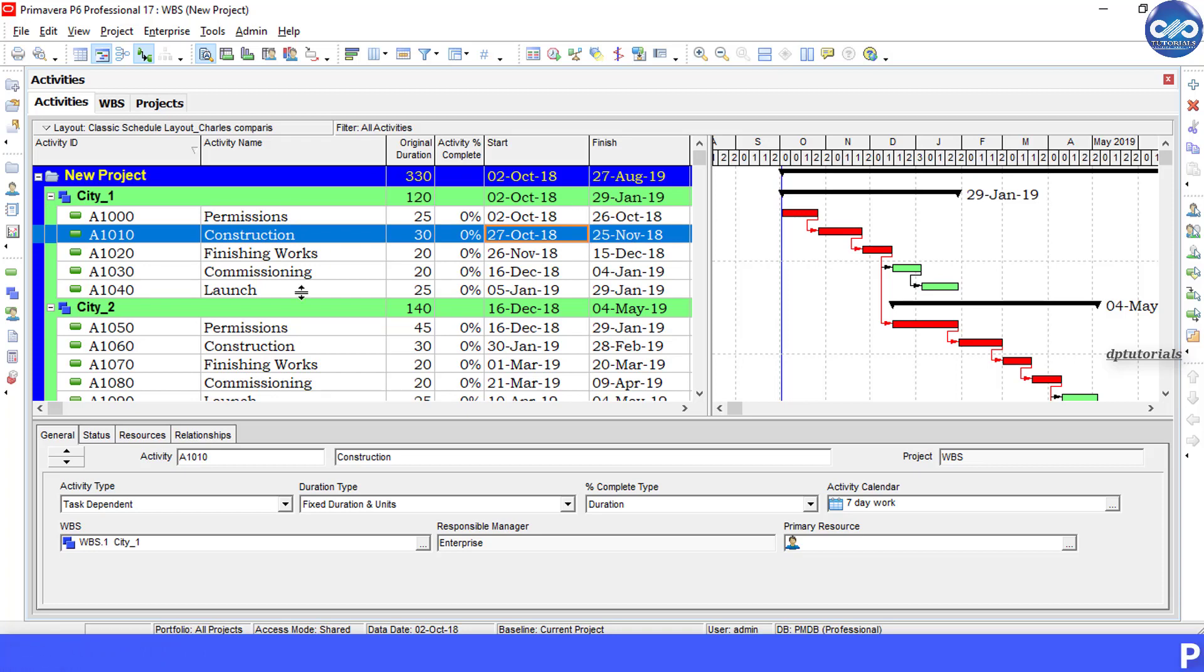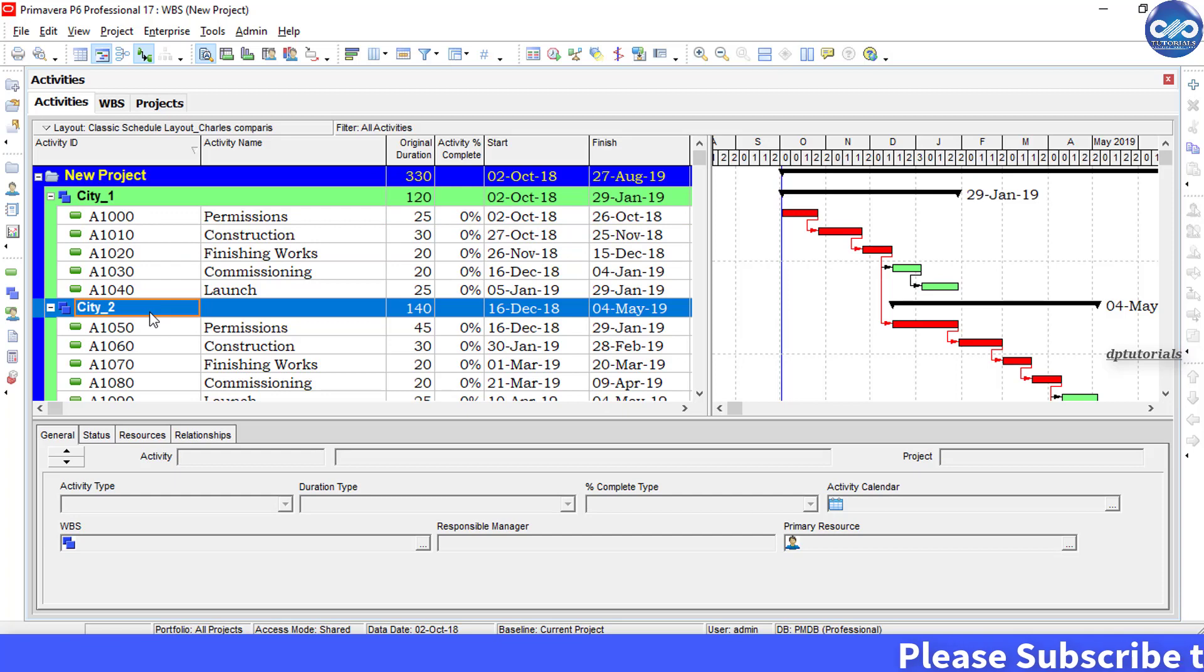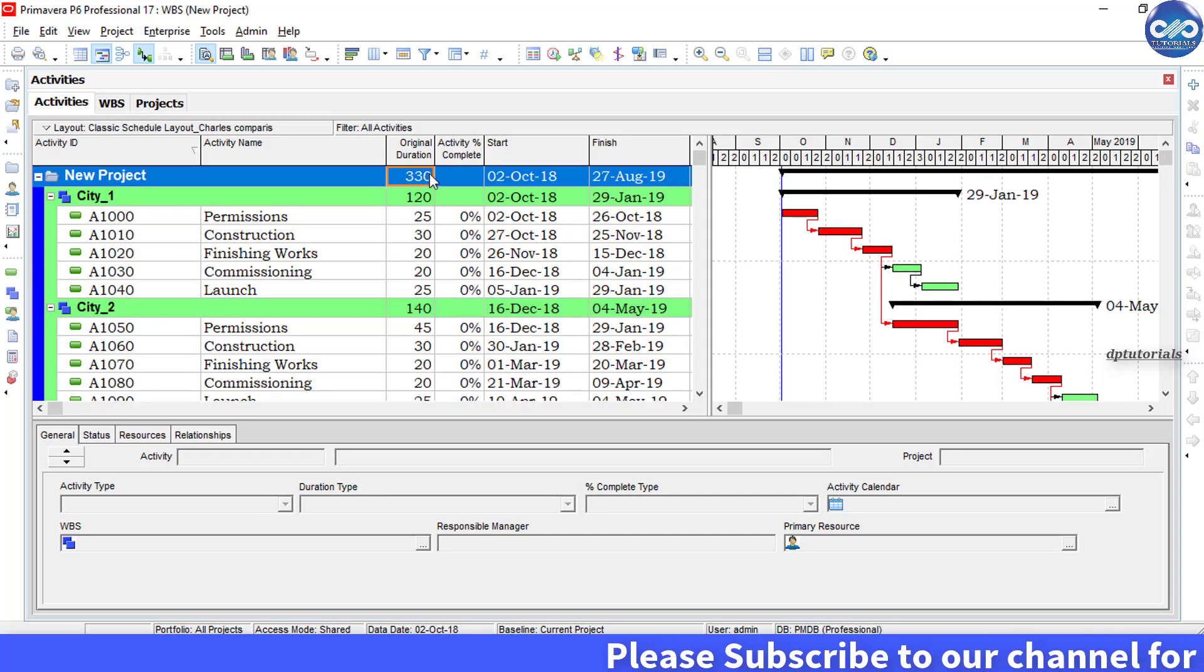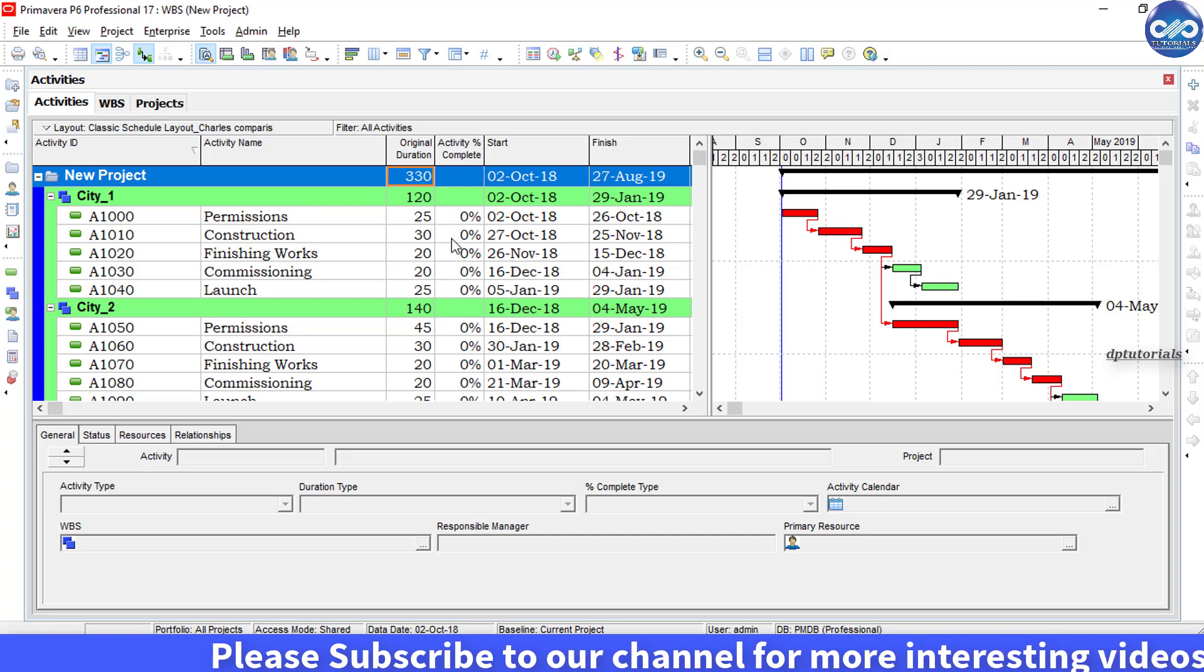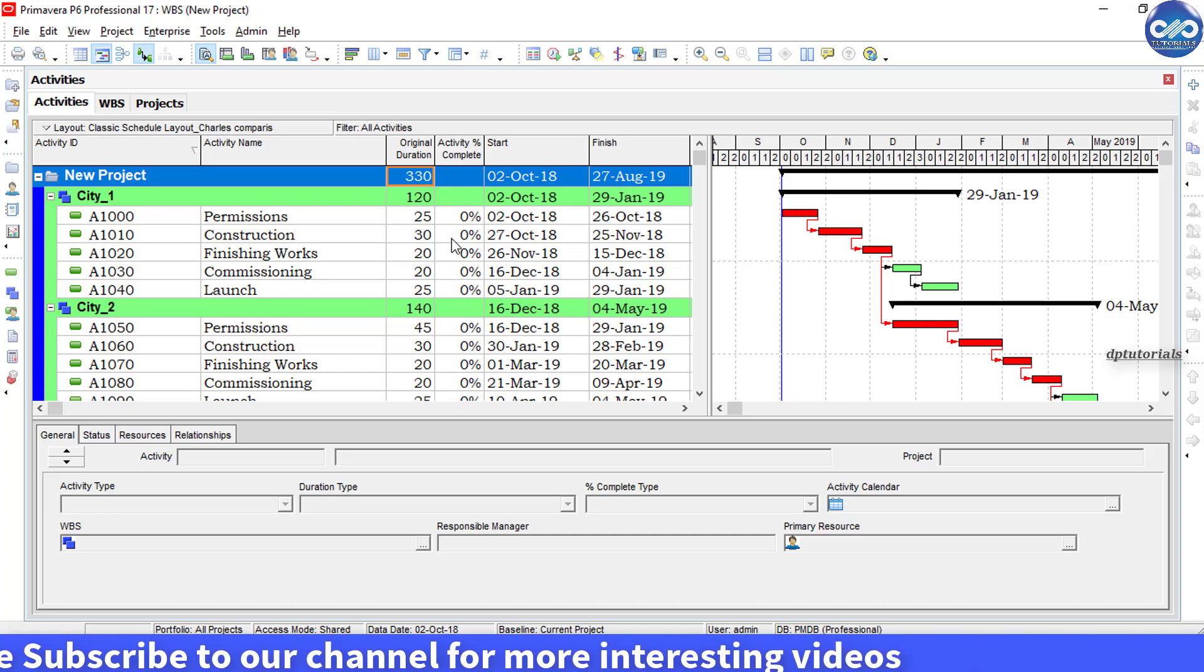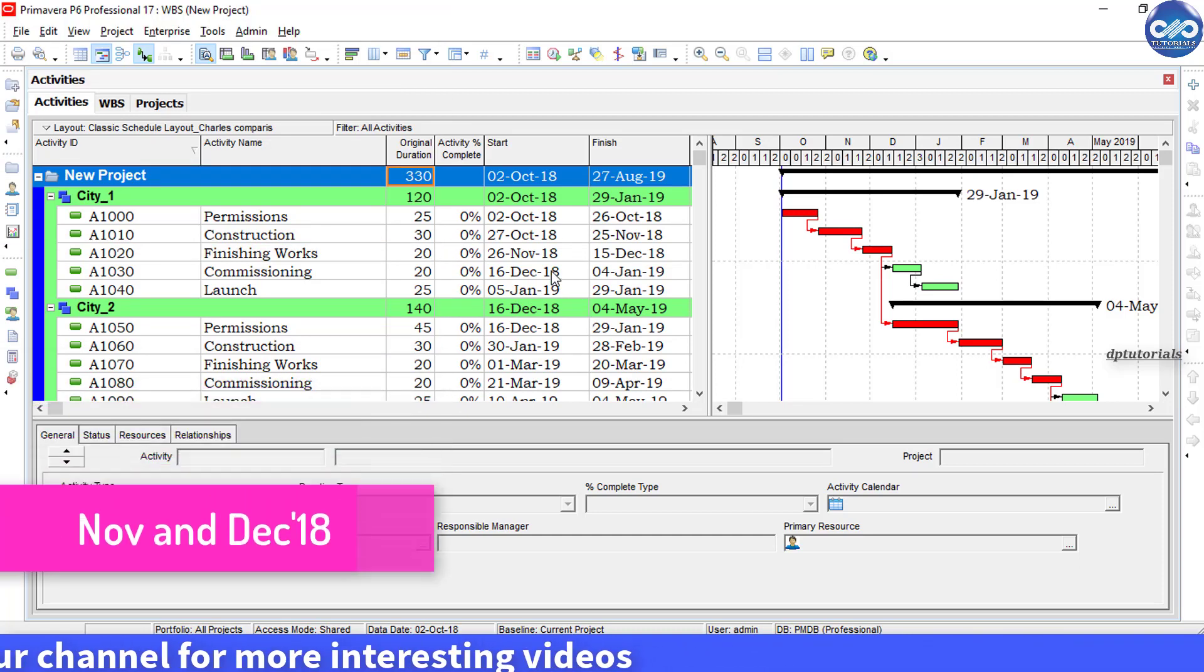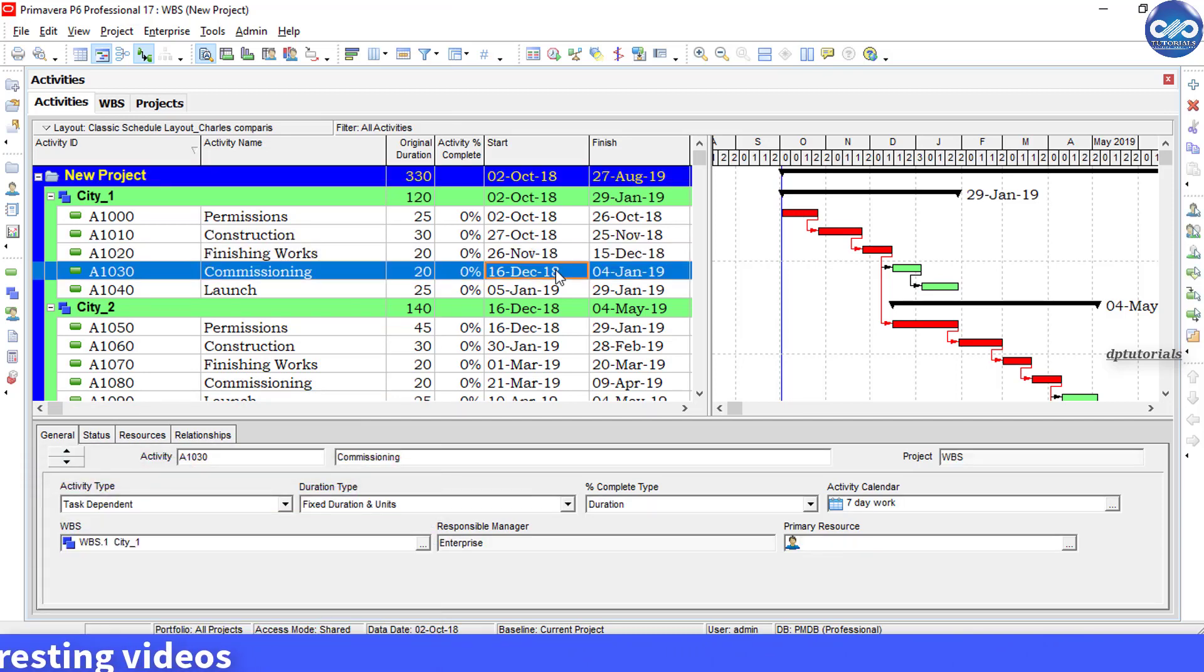Let us understand this with a small example. We have a sample project containing three cities. The total duration of the project is 330 days. Now we need to filter which cities will start in the next two months, say November and December.